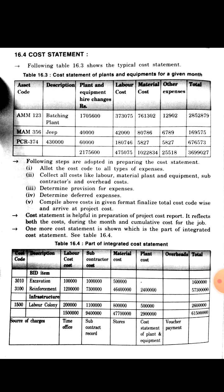The following steps are adopted in preparing the cost statement: first, allocate the cost code for all types of expenses; second, collect all costs like labor, material, plant and equipment, subcontractors, and overhead costs; third, determine the provision for expenses; fourth, determine deferred expenses; fifth, compile the above costs in a given format and finalize the total cost code-wise to arrive at the project cost.